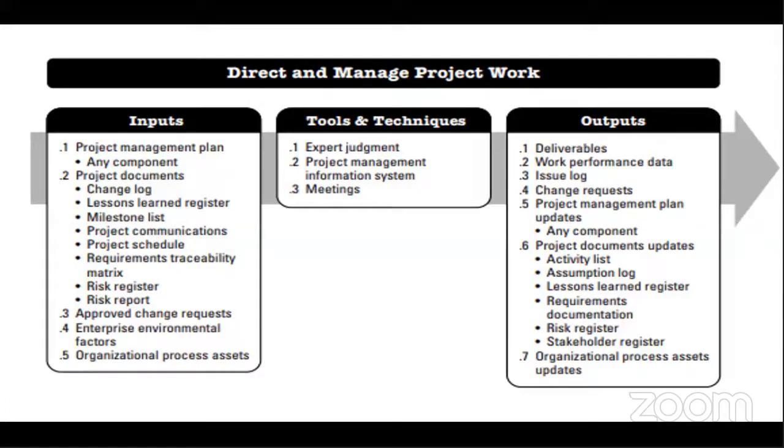After we are done with the planning, also a phase with a series of activities under it, we are going to have an approved building plan as a deliverable. Having the approved building plan gives us the go-ahead to go to the next phase, which could be designing the foundations and all of that. By the time you finish the foundation, you have the foundation as a major milestone of the building.